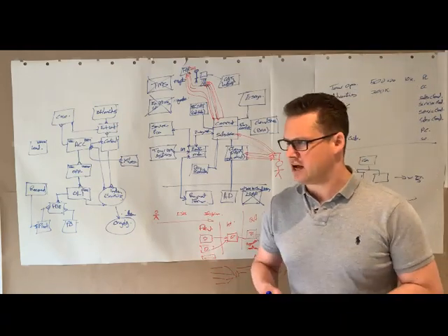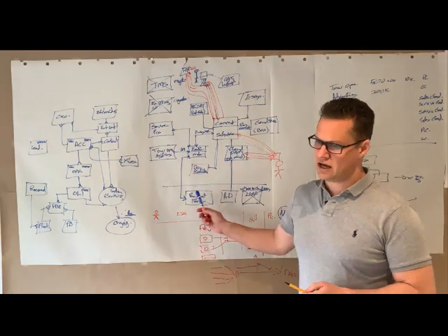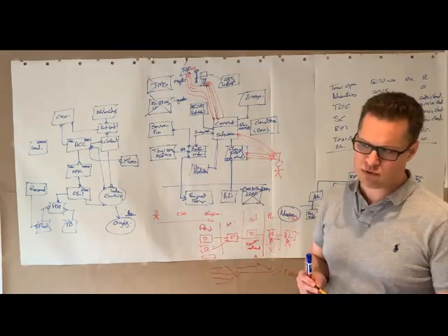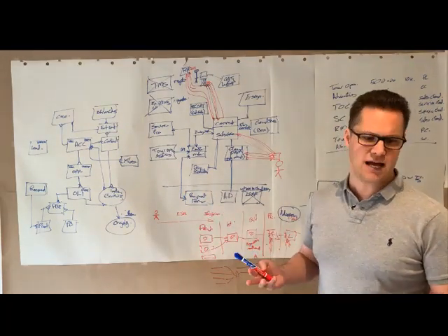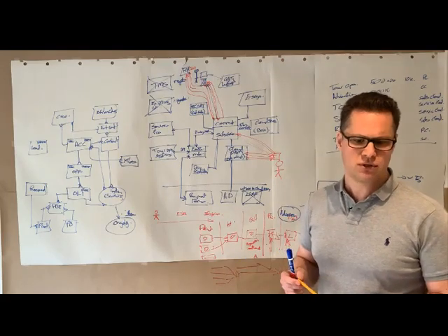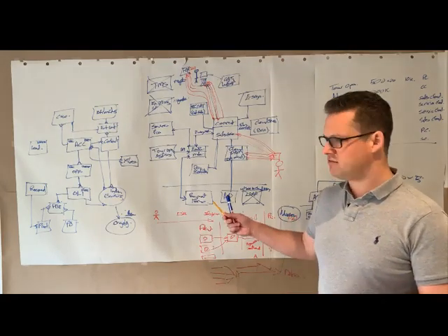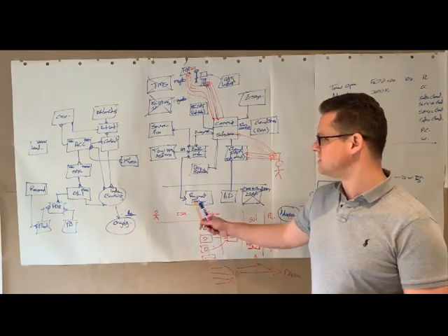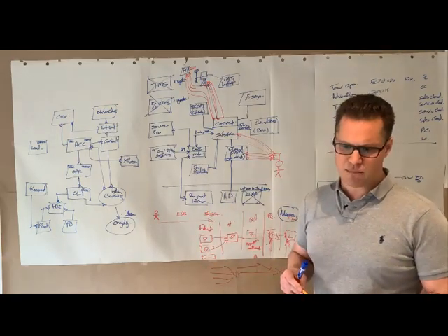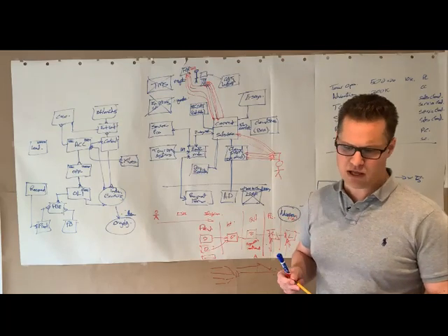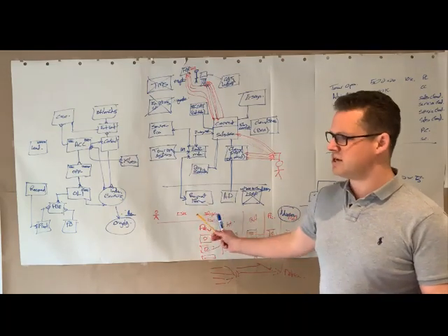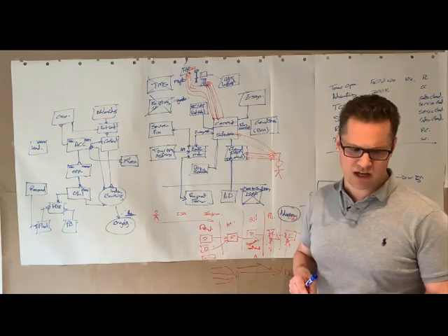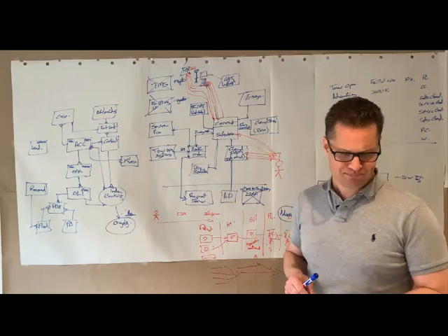So I think this is probably the one to look at, with reference to the impact that it has on the overall delivery schedule. If the fixed windows that we have for releasing and the additional testing that's required around this system become a real problem, then it might be worth re-evaluating this to see if replacement would be better.